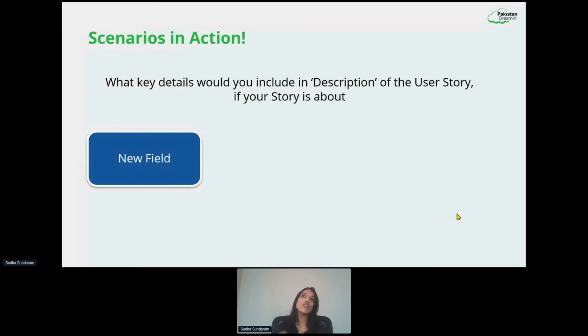right? And also, while we are grooming the story with our PO, certain things could come to our mind like, hey, am I capturing these account levels just in Salesforce? Are we going to send these account levels to any other downstream systems? Does this information need to be passed somewhere else? Then there's a different ballgame where an integration comes into play, which would necessarily become your separate user story, right? So as we groom and as we discuss the story elements, we might actually end up creating more stories to capture the full process.